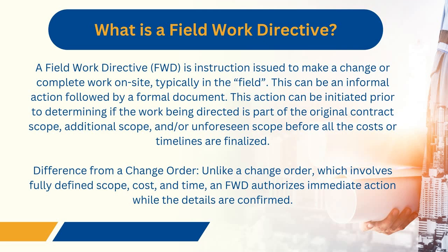documentation. This action can be initiated prior to determining if the work that's being directed is part of the original contract scope, if it's additional scope, or if it can be measured as an unforeseen condition before all costs and time are finalized. The difference from a change order: unlike a change order which involves fully defined scope, cost, and time, a field work directive is going to authorize immediate action while the details are being confirmed.